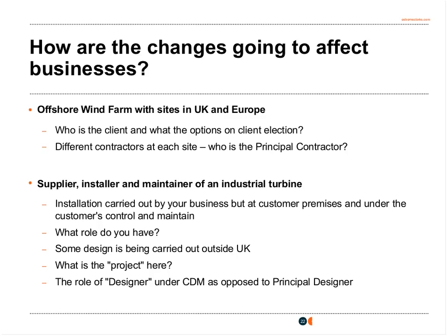And those of you familiar with this under CDM 2007 will have been familiar with the fact that there is a concept of client election. So one party could elect to be the client for the purposes of the CDM 2007 regulations. Now, under CDM 2015, it is essentially the same. So the parties can decide in writing who is going to perform the role of the client for the purposes of CDM. And that client will be the one that then takes on the client obligations under CDM 2015.